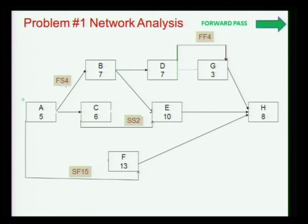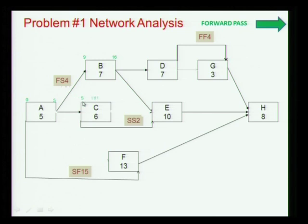We now do the forward pass — the analysis goes on. This is the early start and early finish. This becomes 9 because of a finish-start with a lag. This goes to 16. Here we start this at 5, giving 11 — that is 5 plus 6 equals 11. This is a normal finish-start, so 16 and then 23.